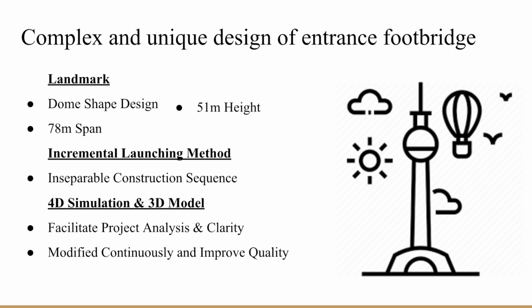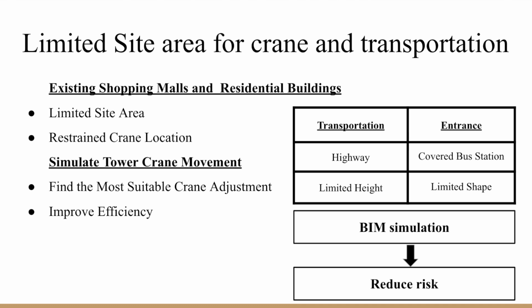The construction sequence of the bridge is therefore so closely connected that it is inseparable. The 4D simulation and 3D model of BIM technology therefore facilitate the analysis and clarity of the project team on the construction process of the bridge. The 4D simulations have been modified numerous times for the inseparable temporary and permanent components, and improve the construction process continuously each time.